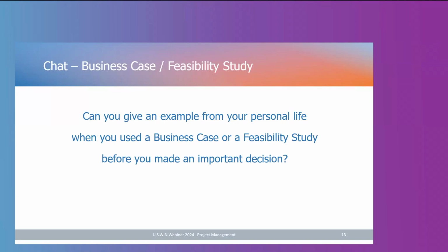Yes, sir. All right. So out here at the Palo Verde Generating Station, feasibility studies are important to us, especially when we don't know exactly what the project deliverable is. For example, on one of our normal chiller replacement projects, there were multiple options to replace the normal chillers: in place, move them to a location, or go to a modular chiller plant. So a feasibility study was very important to us to determine the best path forward for the station before we completed our business case and moved forward with the project.